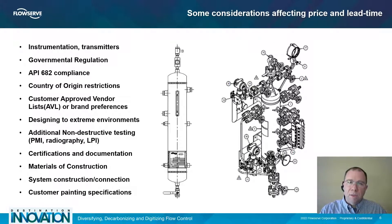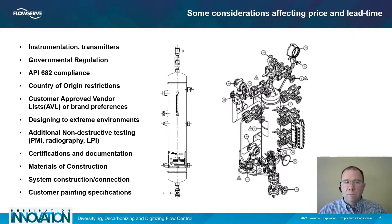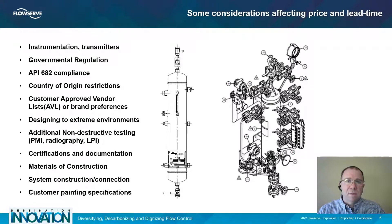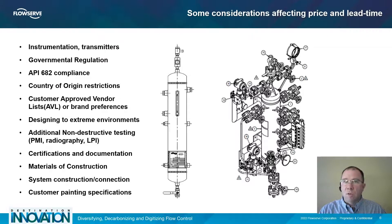Governmental regulation for the specific end user location is also very important to communicate. Failure to do so may lead to significant delays in shipment and rework costs. If you work in the oil and gas industry and require compliance to API 682, it's very important to communicate this upfront. API 682 compliance can add two or three times to the cost of the system and may add to delays and longer lead times due to component availability.